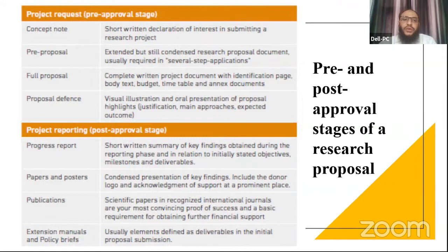When the proposal is approved after the proposal defense, the other stages are known as post-approval stages. In this, after approval, you have to submit the progress report at a fixed time interval of 1 month, 6 months, or 1 year, etc., until the closure of your project. So you have to submit the progress report on a regular basis, at a regular interval of 1 year or 2 years or so on.